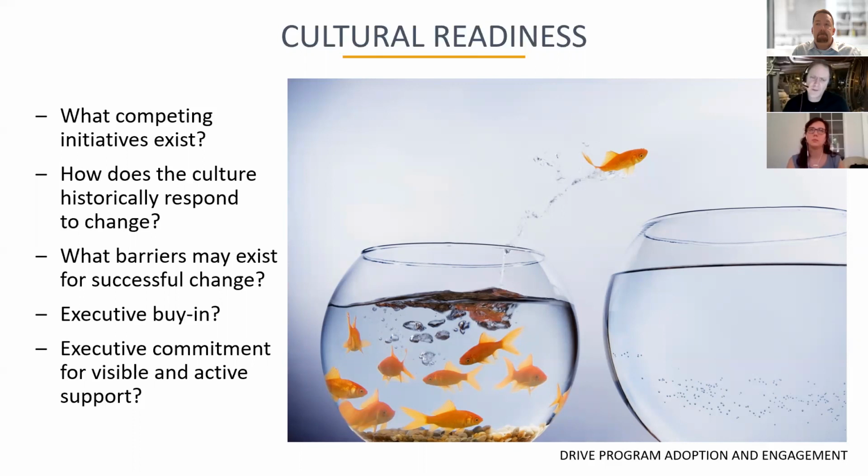And keep in mind that the cause and effect of that change obstruction in one area may be completely different than another. I've had other areas where a business process, or really the time of year and concerns about being able to do their job, was more of the obstruction. So you have to be cautious, and you have to really work to have very specific change management plans for different parts of the organization.